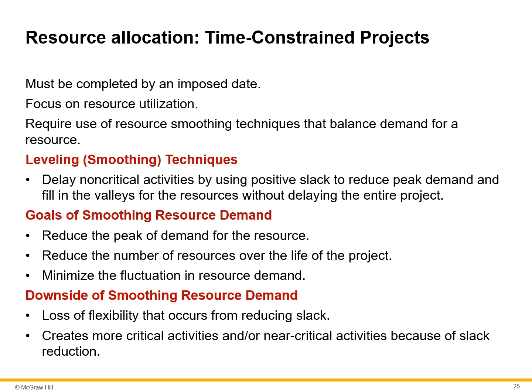Time-constrained projects must be completed by an imposed date, require the use of leveling techniques, and need to focus on balancing and smoothing resource demands by using positive slack. Another aspect of this technique involves the goals of smoothing resource demand. This will help to reduce the peak of demand for the resource, as well as reduce the number of resources over the life of the project and minimize the fluctuation in resource demand.